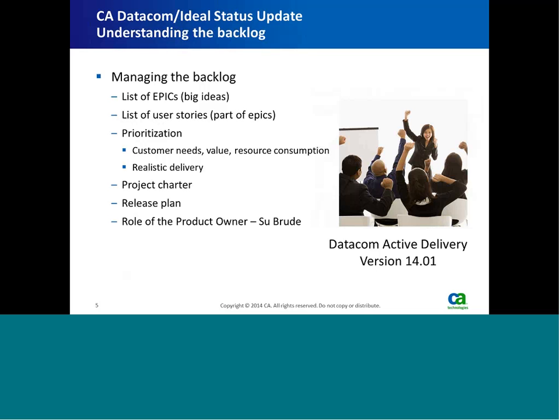And at the end of that 3 to 6 month period, we'll go back to the backlog again and see if the next items that were on the list are still the top items. They may not be, but being agile allows us to do the things that we can do right now, deliver those, and then go back and review what comes next.